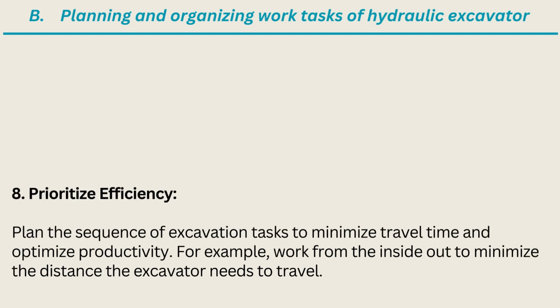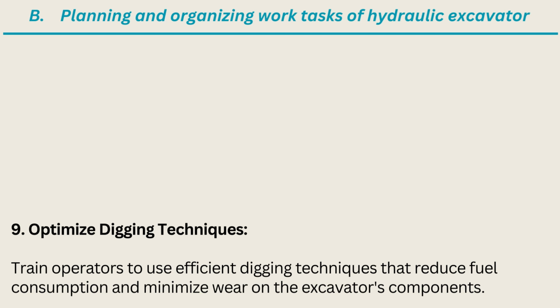8. Prioritize efficiency. Plan the sequence of excavation tasks to minimize travel time and optimize productivity. For example, work from the inside out to minimize the distance the excavator needs to travel. 9. Optimize digging techniques.